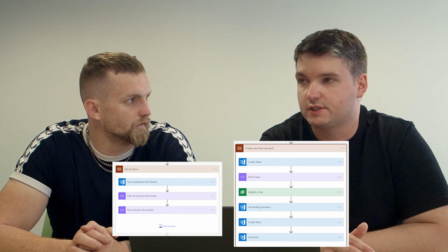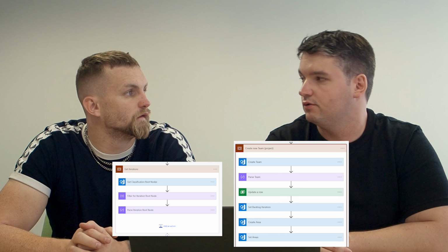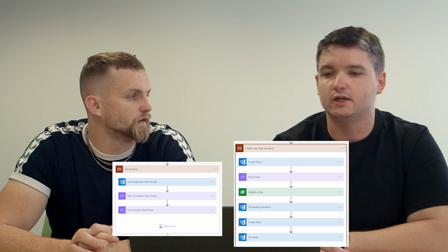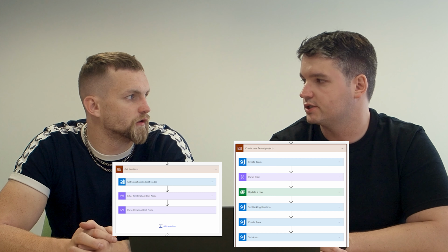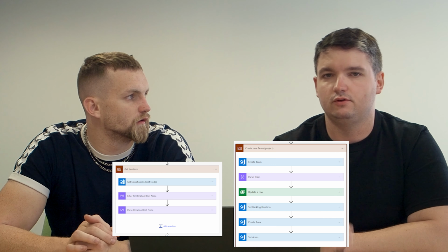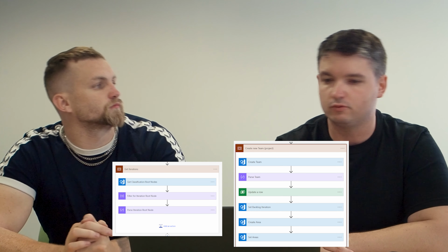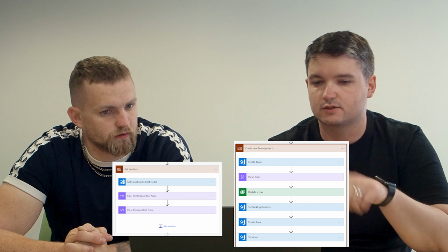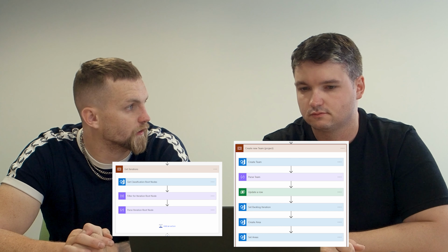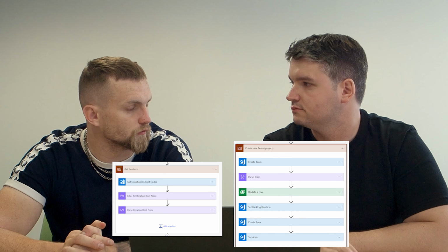When you create a project in DevOps, it creates a whole lot of things automatically, which you don't get through the API. So when you create a project, for example, it doesn't create the iterations, it doesn't create the teams behind it, the default ones. So then you have to create the project, create everything, and then there's certain settings you have to get in place before you set up the next bit, and it gets quite complicated. So as well as the API, you've also used a standard DevOps connector alongside doing some more advanced stuff with the APIs and the graph calls, etc.